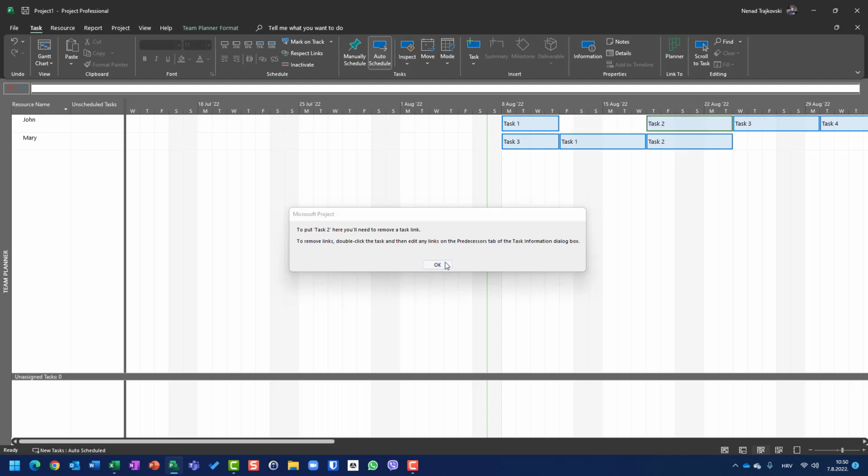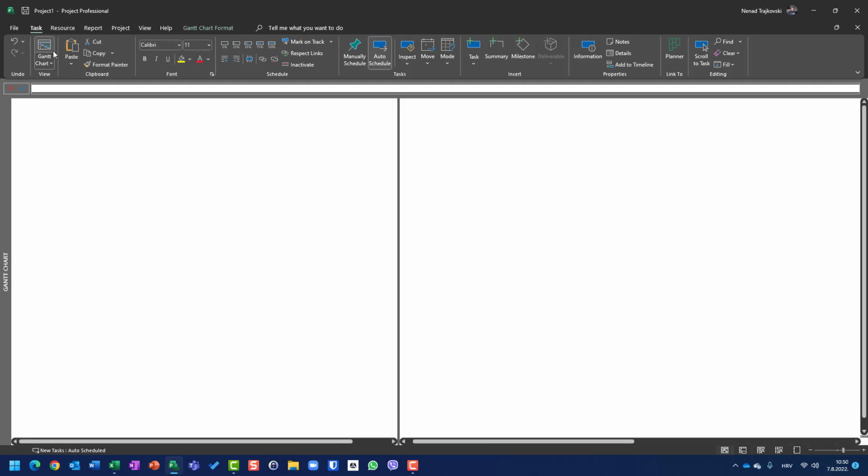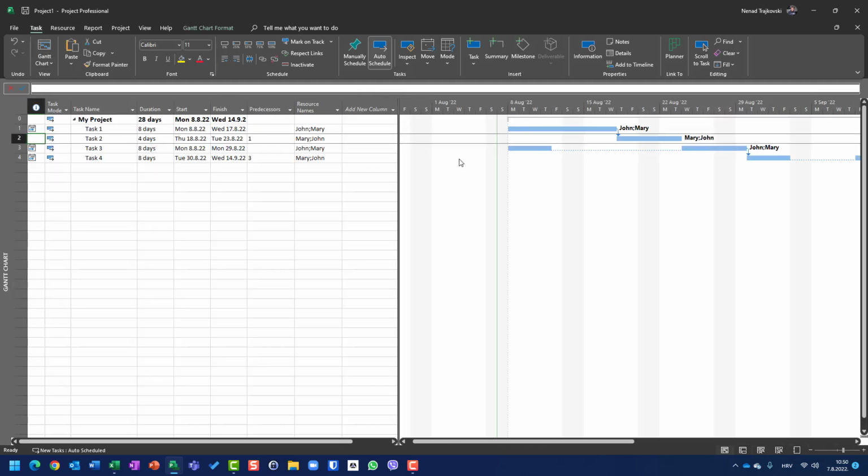So here I will not do it. Once again, back to my example, task 3 is supposed to be worked on by Mary here, but after 1, 2, 3, 4, 5, 6, 7, 8 days, after this task 3 is finished by Mary, John, 8 days after that, is supposed to work on the same task, so it will be split, as you can see, in 8 days.